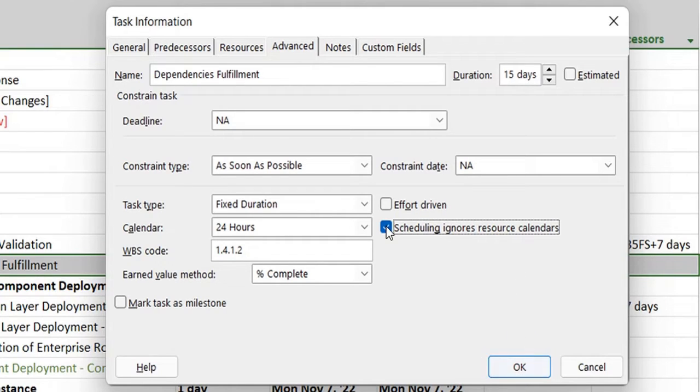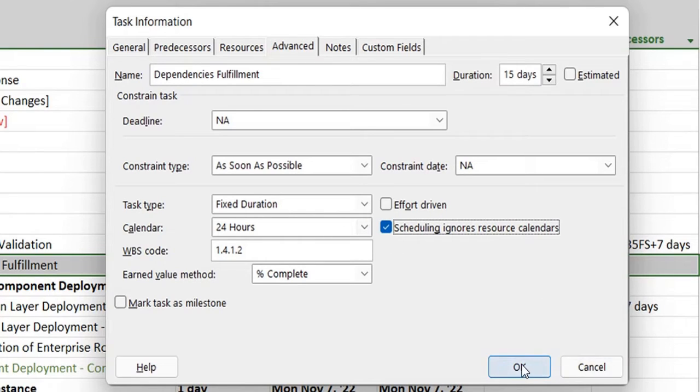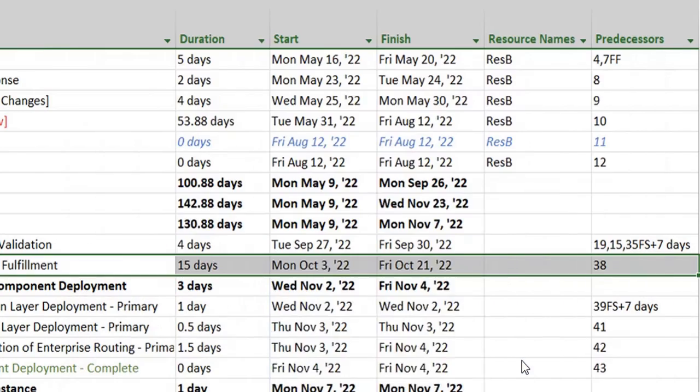If there are any scheduling that's hindering it from resource calendars, I'll just ignore it for now. You can also keep it unchecked if you want your resource calendars to override the scheduling for 24 hours, and I click OK.